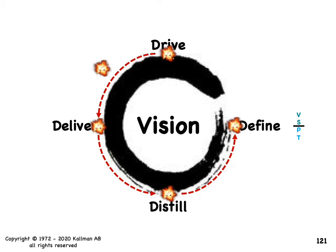Just like with the 4R model, you can use the 4D model in reverse. When you're doing your retrospective and your review, if what you delivered didn't match what the product owner and the stakeholders were looking for, then you're going to have to go back and look at the delivery and look at your distilled agreement. What did we agree to in the sprint backlog during sprint planning, and then ultimately go back and look at what were our definitions.